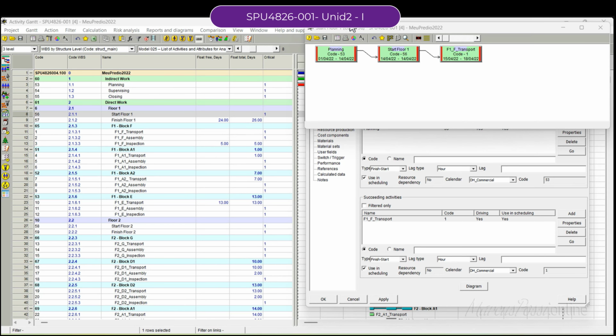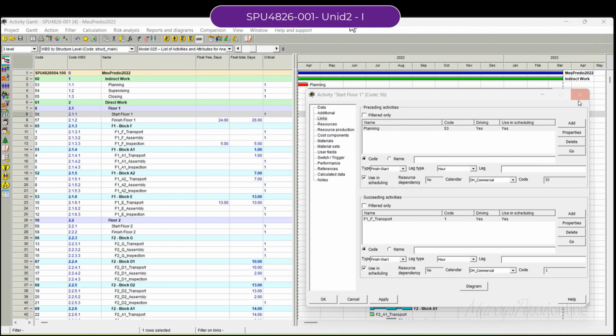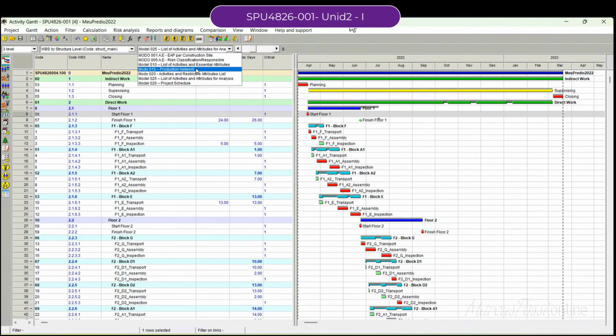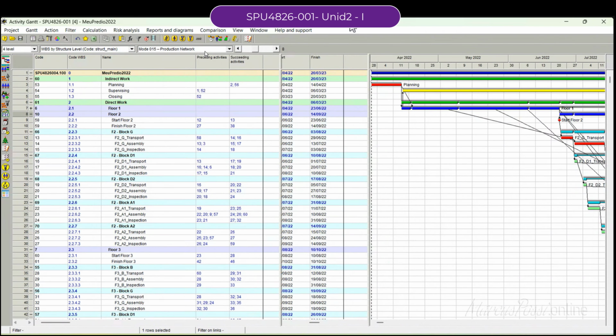My first team starts to work, but did nothing during this time. On the second day, I will be there to start my work with nothing being produced before. So instead of using a duration lag, the lag type is volume. That's a very interesting feature to work with.